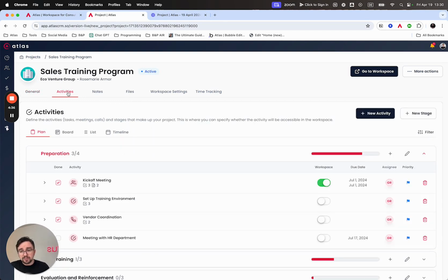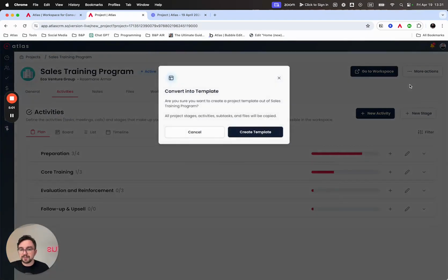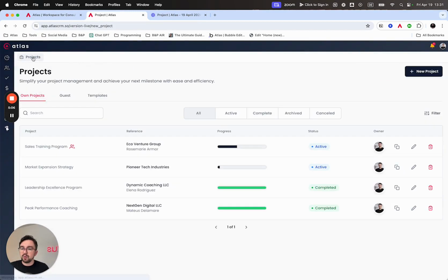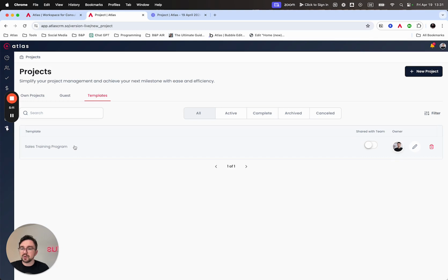The nice thing is, once you have done this project, let's imagine I have finalized the sales training program, all activities are complete, and I thought, okay, that's a really great program. I probably want to sell this kind of service to more customers, or perhaps I have other colleagues that I'd like to offer this service. I can just come here and convert this project into a template. Once I create a template, I go back to my projects and I see templates here. There is a template called Sales Training Program.